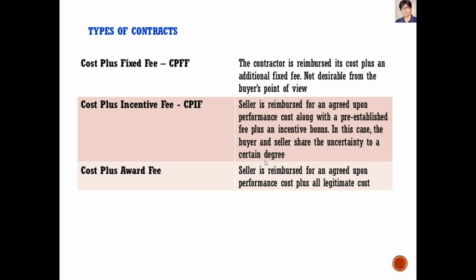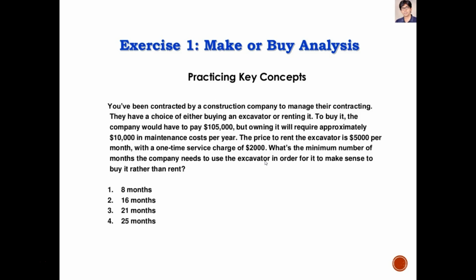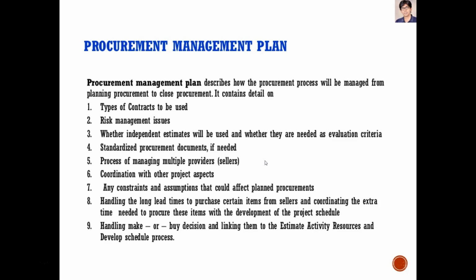So from both sides, these contracts can get kind of ugly, especially when it flips to this idea of cost plus. So part of what our issue was, or their issue with us, was we didn't inform them all along how much more we were spending every month we were there, because this ended up about a 6-month endeavor to get this actually done. So make sure that everybody is aware of what's going on, especially on those fixed costs, because if the cost increases, you can get burned fairly easily.